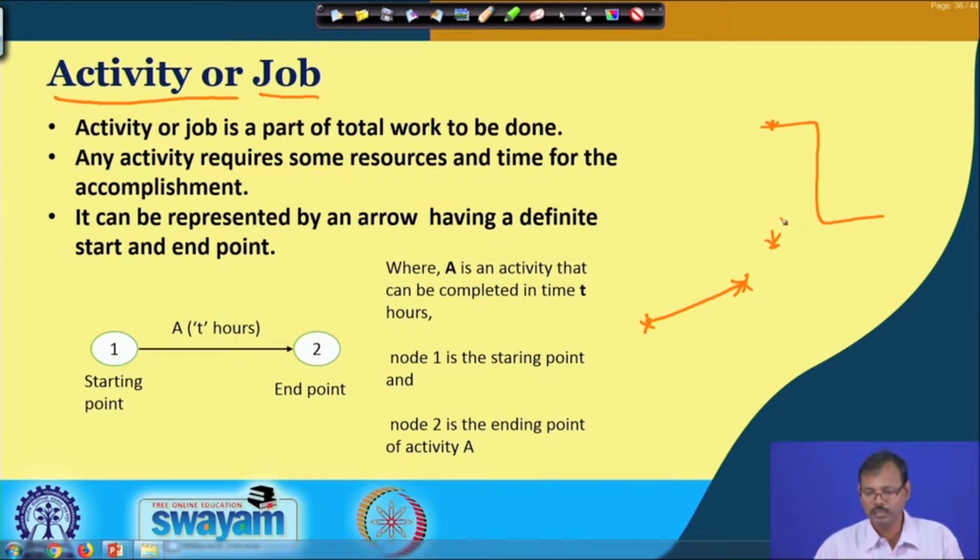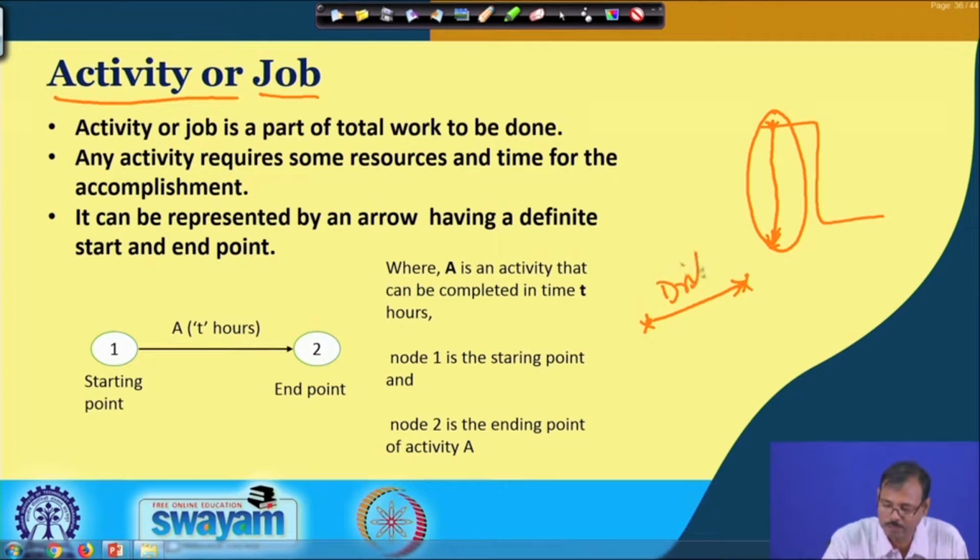So, that is the drilling requirement. That is why for an arrow there must be a starting point and an ending point. So, these activities are expressed in those terms, that this will be the drilling work carried out here, and this is expressing the drilling which is being started at this point to this point, but not physically these points.